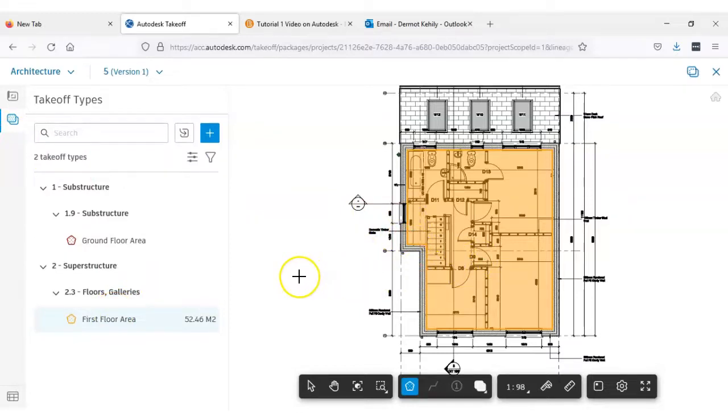So I suppose moving on from that, what else could I measure? Again, we started this last week. I know we deleted it, but let's look at measuring maybe some of my internal walls, just to give you an idea how you might do a linear length measurement, and then multiply it by a height to get, I suppose, a wall area. We'll do external walls at a later time and maybe start with the internal walls because they're a little bit easier. Obviously, doors and sanitary ware are quite easy in terms of counts. We'll get to that, but they're pretty self-explanatory in relation to setting up a count and pointing and clicking. So let's add another measurement here.